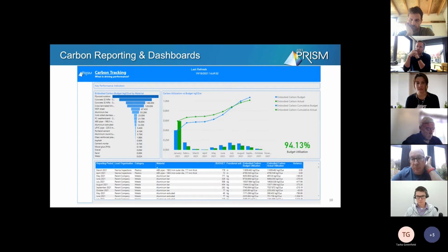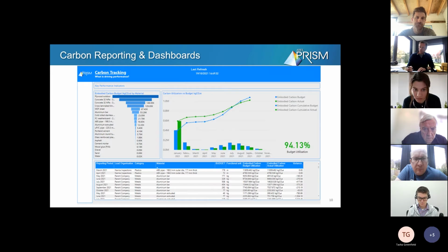The reporting of that can be as a quantity, or as a value or some other metric, but it's still the same. We're still trying to see what carbon I have in my budget, and what my actual carbon expenditure is. Where was I able to save carbon by using alternative materials, and where did I go over my carbon tariff because something went wrong with my material deliveries or my productivity? So we should be treating them exactly the same.